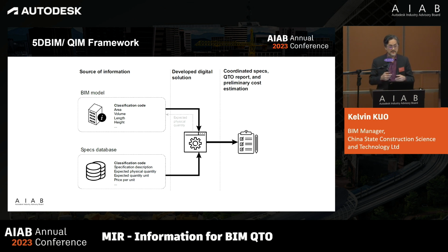Then I suppose we can do some automation and use some AI approach to match these together. So we read from the models: if they contain a wall element, if they contain a concrete grade, then we know this should be a concrete wall with a certain thickness, and we can apply a coding to it. And then, according to this automatic coding system, we can do the classification works.